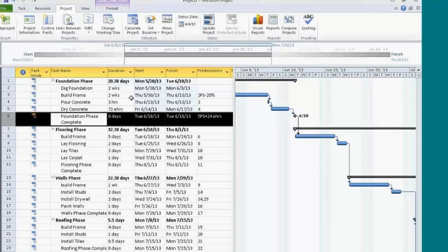The other thing that you've noticed, I haven't touched a date yet. We're going to be finished on time. I also know when we have to start, but I haven't touched a single date. The moment that I start to see calendars show up in this information area, I start to suspect that somebody's been playing with these dates and they may not actually know how to use project correctly. So next time you open a project, look for calendars on the left-hand side. If you see quite a few, you know that they've manually entered in the dates, and those constraints are going to cause you real headaches all throughout the project.